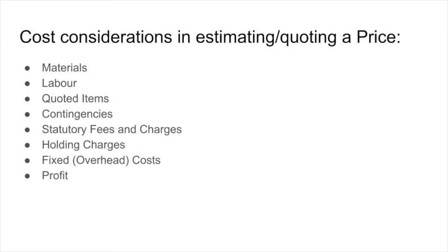Holding charges. This could be anything from interest rates. For example, if I ask you to paint my house, but I don't want you to do it until December, you go buy the materials now, theoretically you could incur some costs because of that in terms of interest or the like.